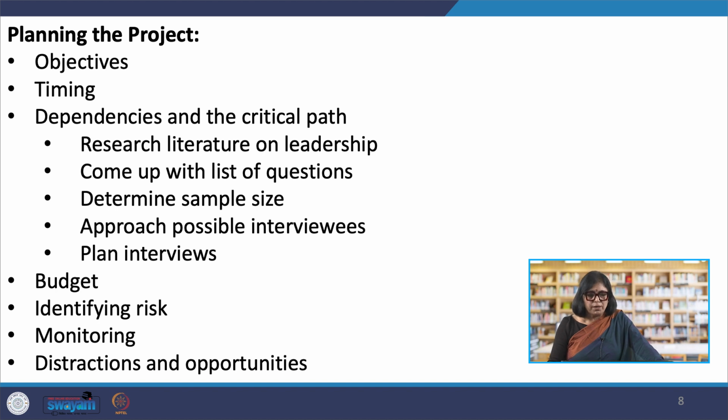Once you are into the project, even though you may have to do some planning as you go along, a major management activity will be checking progress against the plan. This will involve assessing where you are against your schedule. Are you up to date or behind? Which tasks are complete and which are not? What percentage remains to be done? If you are behind, how will you retrieve the situation? Can you throw extra resources at the problem? There is also reporting to someone else, who may be your tutor, supervisor, grant awardee, or a sponsor, updating them with your progress.